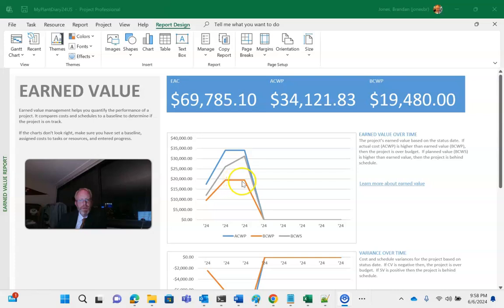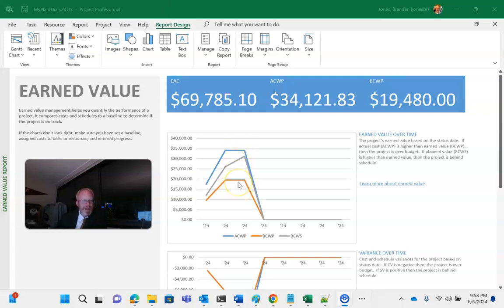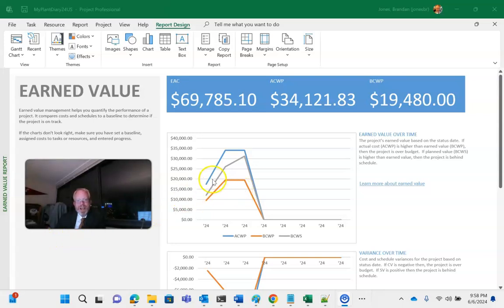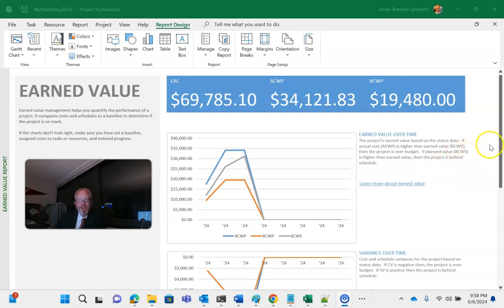Now actual cost of work performed is saying, of this work we performed, how much did it cost? And you see a blue line that's significantly above the orange line indicates that we are over budget. So if we see this blue, gray, orange, that means we're over budget and behind schedule, which, as I say, that's not uncommon. But on the other hand, if we had the gray line here, the orange line above the gray line, and the blue line below the gray line, then we would be both ahead of schedule and ahead of our budget.